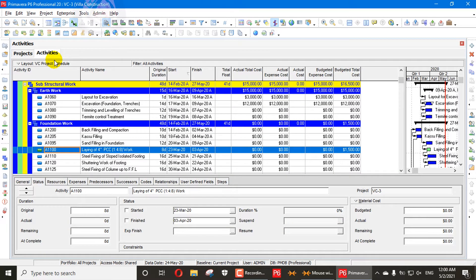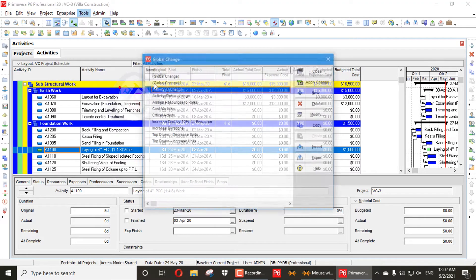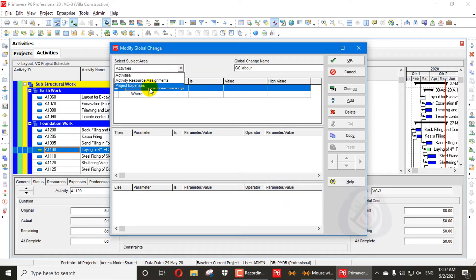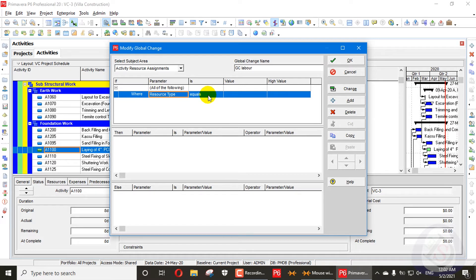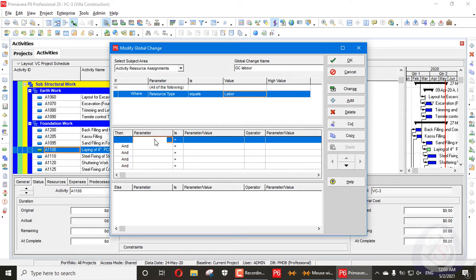When you go into Activities, first go to Tools, then to Global Change and click on it. Add a new global change. First, name it 'GC Labor' or 'Labor GC'. Then go to Activity Resource Assignment and select Resource Type equal to Labor.